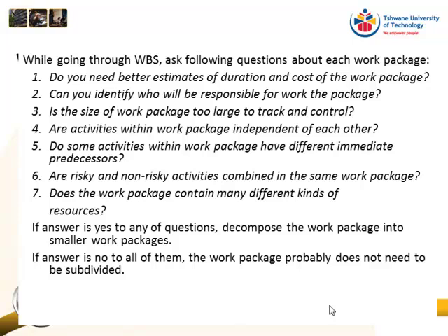Because you only realize at the end, when the engine is supposed to be fitted onto the Boeing, that the engine isn't completed, and there wasn't a prototype that was tested and all these intermediate steps. And the project management rule of thumb is that normally the size of a work package is 2 weeks. That's just the rule of thumb.